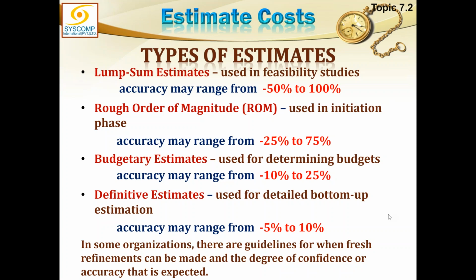Sir, in such projects, to mitigate this we do an RFI to get a rough estimate. What is an RFI? Just ask the supplier about this project. It is a request for information. But that is a rough estimate, and you will do the definitive estimate when you are actually estimating each and every activity. You would know certain facts and estimate them, and where you do not know, you will float an RFI, request for information, and as a result you will get the rates from the market, and those rates could be used for your detailed estimate.